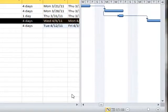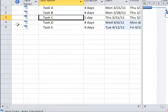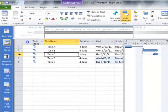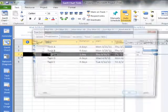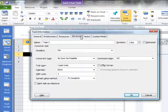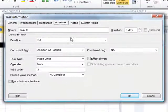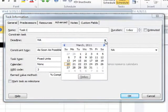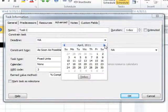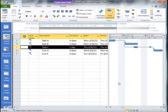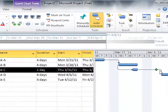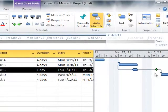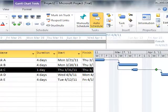One of the things that we can do for a particular task is we can set a deadline for it. Let's say that we want to set a deadline for Task C. This is not necessarily a hard and fast date, but we want to just mark the time at which we expect that equipment to arrive in our calendar. We're going to go over here to Advanced, and you can set a deadline. In this case, I'm going to set a deadline of April 4th. You'll see on the graph how this has made an actual deadline indicator to indicate when we expect to receive this particular product. This may trigger us to look and see did we receive this by this particular date, and if not, maybe we need to track it or do something to figure out where that shipment is.